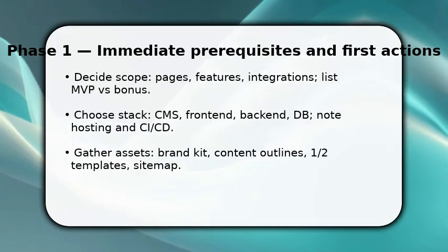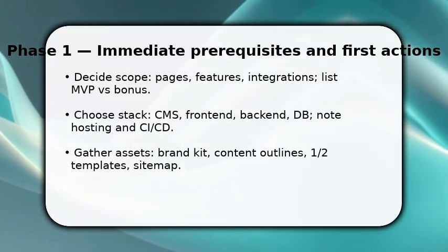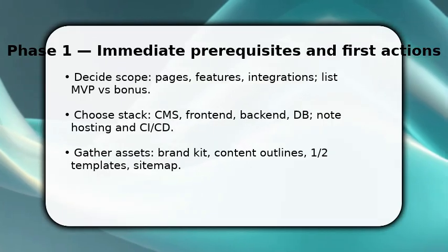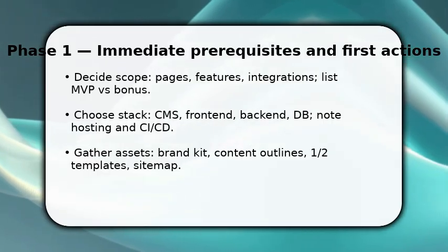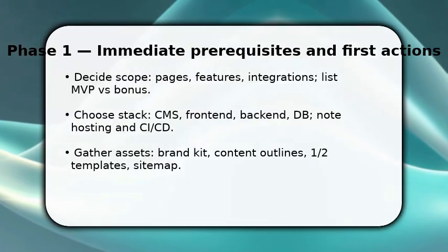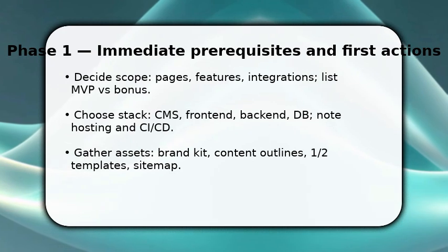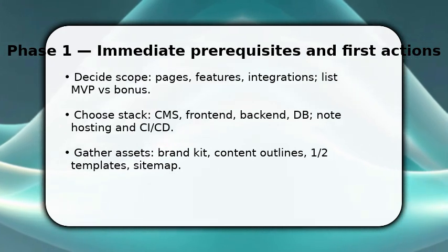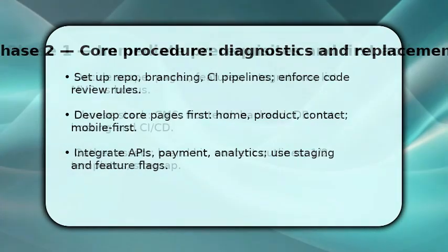Then gather brand assets, content outlines, a sitemap, and basic 1/2 templates. This accelerates design and dev. Finally, create a short task list for week 1, assign ownership, and schedule a 30-minute kickoff to begin actual work. You move into building with a clear order.